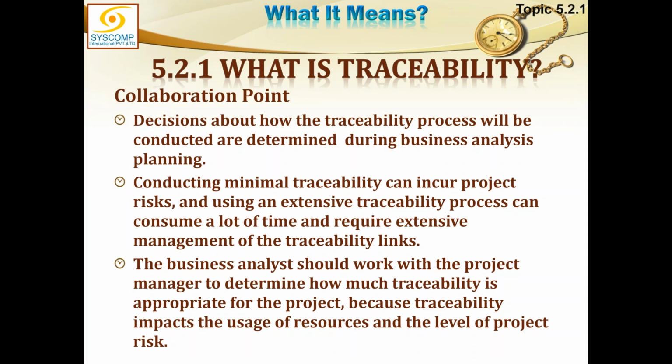As I said earlier, if it is a complex project, we probably cannot take any risks and we have to go into the minutest details. But on the other hand, if there is a simple project which does not carry a lot of risks, then we should not waste a lot of time in establishing these traces. Business analysts should work with the project manager to determine how much traceability is appropriate for the project, because traceability impacts the usage of resources and the level of project risk.